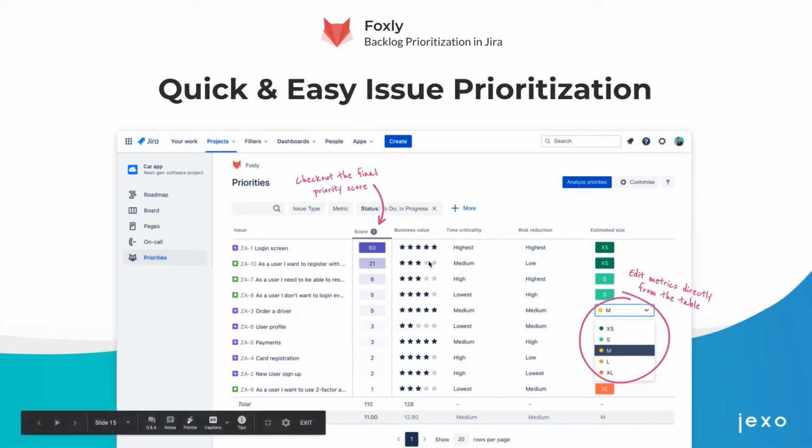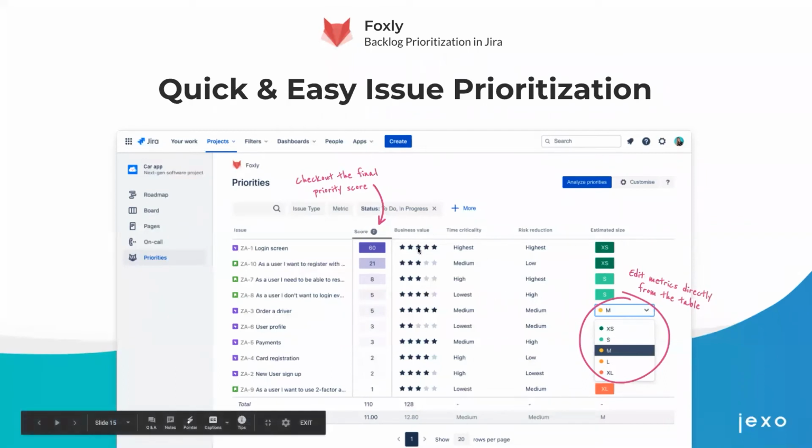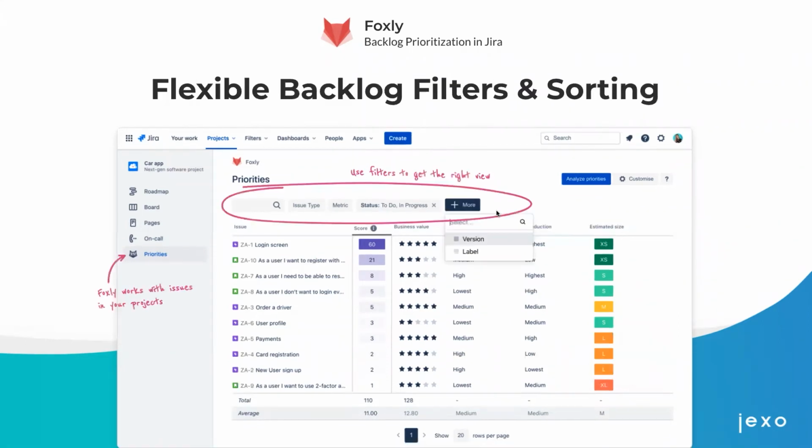And you have here, as an example, a custom method. So in this example, we have business value. How valuable is this item for the business? The time criticality, another aspect that very often you don't see taken in consideration in teams that only use the size of the item, and there's no way for you to associate the time criticality to an item. Risk reduction and estimated size. So this is just showing another example of custom metrics.